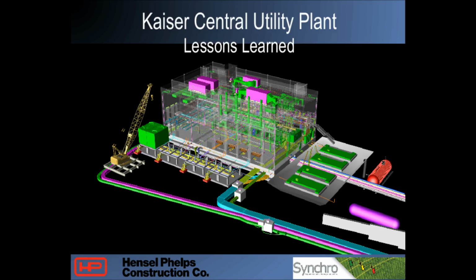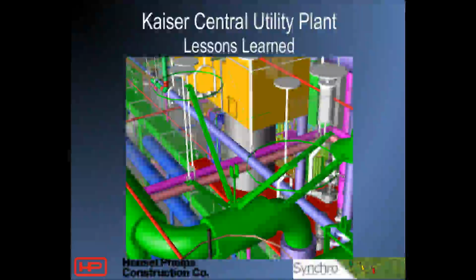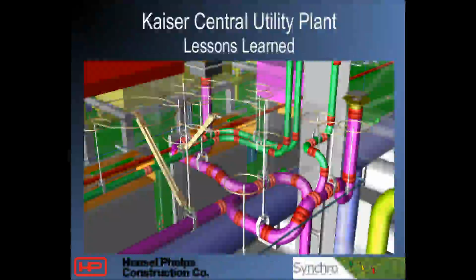We've got the generator. She goes, when I come in and I start drilling, I'm going to be throwing rocks, I'm going to be throwing dirt and everything all over the place. So in that buyout meeting, what you saw in this video, we were able to move him up 8 months in the schedule. So like I said, taking a small little piece of the entire model to convey your point. This saved us potentially a claim, some damage to the building, and also allowed us to move him up 8 months in the schedule.